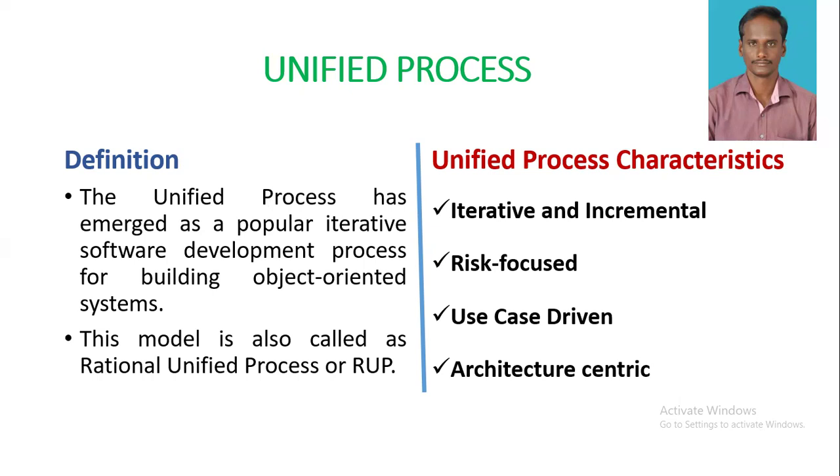The first one, iterative and incremental. In this life cycle approach, development is organized into a series of short, fixed length mini projects called iterations. Each iteration includes its own requirements, analysis, design, implementation, and testing activities. Each iteration results in an increment, which is a release of the system that contains added or improved functionality compared with the previous release.